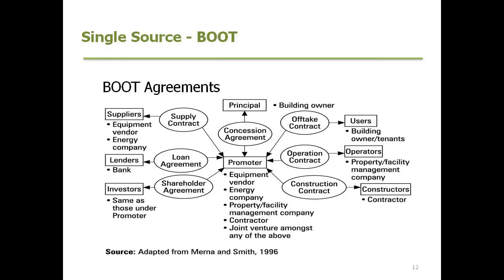If we look at the diagram of build, own, operate, transfer, and push that out a bit more with more details in it, you can see really it is a lot different to a traditional form of building delivery or even design and construct. There's a lot more history, knowledge, and operating data that's vital in putting forward a bid for a BOOT project, a single source project. So there's a lot to consider when tendering on such a project.